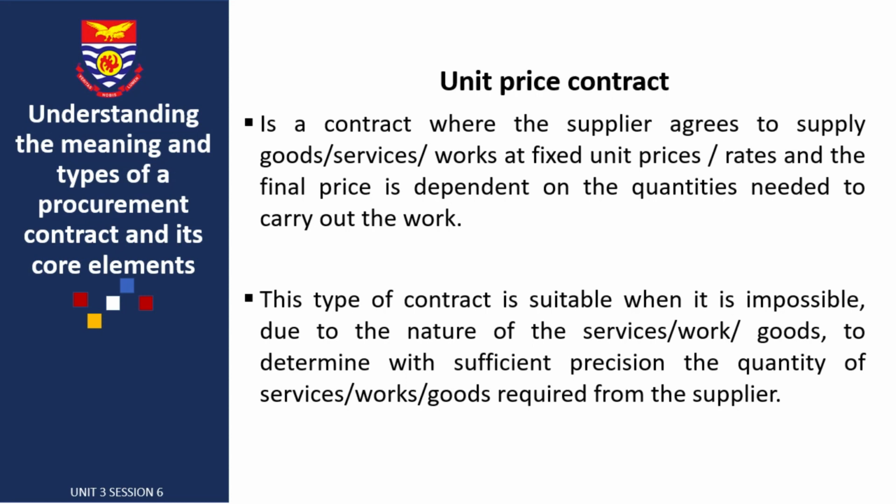This type of contract is suitable when it's impossible, due to the nature of the service or work, to determine with sufficient precision the quantity of service.